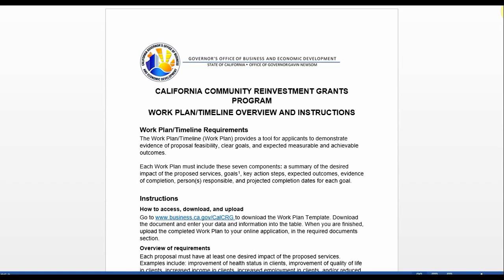The California Community Reinvestment Grants Program Work Plan and Timeline, or Work Plan, provides a tool for applicants to display the goals and activities, expected outcomes, evidence of completion, and projected completion dates for their proposal in a quick and easy way. The work plan will help CalCRG staff understand what the applicant plans to accomplish during the grant period. Further, the work plan will be analyzed to ensure the project can create necessary impact and is feasible given the timeline.